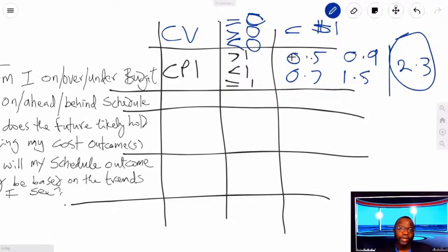So maybe you spent $29, but you got $30 worth of work accomplished. On the flip side, if you have a minus $1, that would mean you have spent $30, but you only got $29 worth of work done. You see what I'm saying?